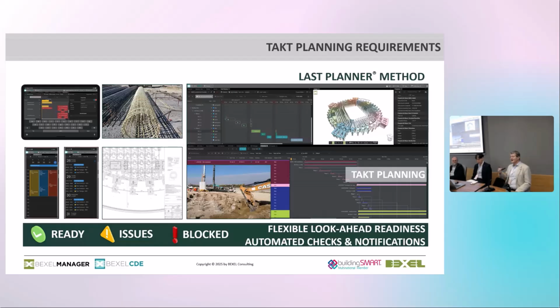Why clashes? You will see in the video why clashes are still there, because I never saw a project bigger than a shed which is clash-free. But if I send to subcontractors, here are the clashes which are not solved, take care of them, be ready, bring boring machines with you and drillers and so on, it's going to cost them less.